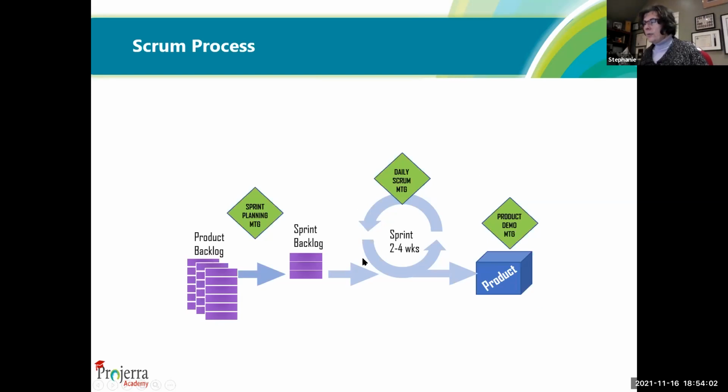You work on that for a couple of weeks, and then you have something that you can demo to the client. And you show them all the cool features that have been implemented, and you ask them any questions that you might have. And then it's for the client to decide, is this good enough to be released? Is it a potentially shippable product? And they might say, yes, it is. Ship it out, release it. Thank you very much. Or no, it's not quite good enough yet. Please send it back for more development.